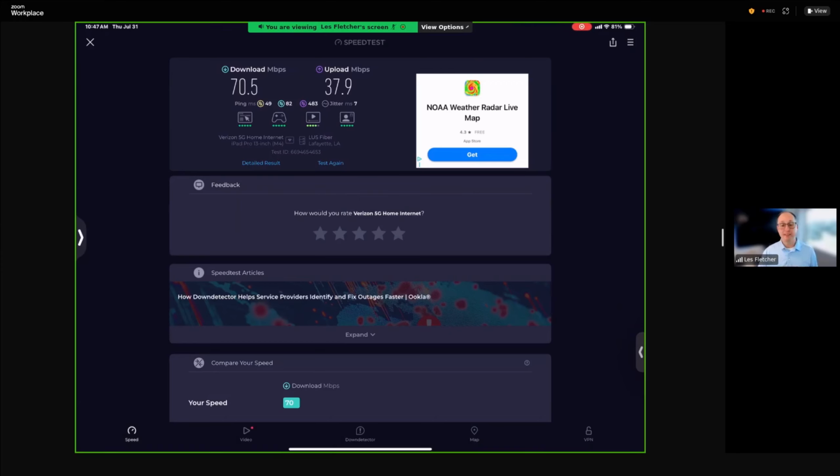If this upload number is ever below, I would say 3 megabytes upload, you need to be working offline every day, because less than 3, you're going to have sync issues and it's going to be a problem. So just another tip, there's another app there that can help you out. It's available in your self-service if you would like to download that.